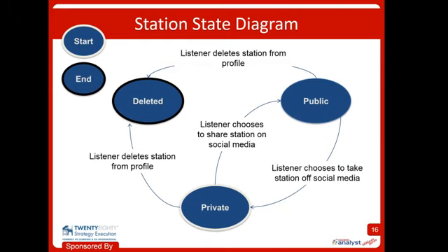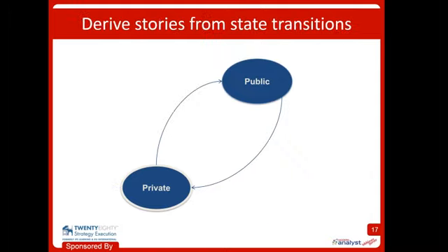This one is pretty simple, but you can imagine if I had 5 or 6 that this thing is going to get a lot messier. And it's hard to figure out, have I considered all the different possible paths through this without putting them in that table I showed you on the other screen? Now, interestingly, each transition in your state diagram is probably a user story, okay?